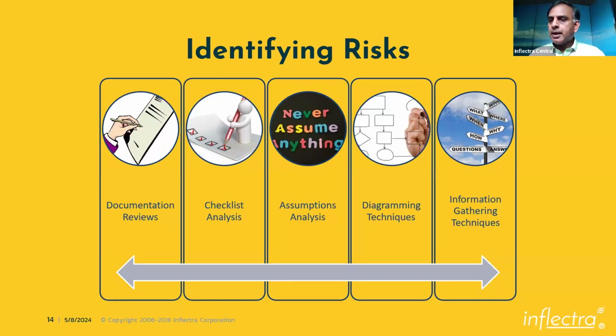Assumptions analysis. How well we are turning our assumptions into risks. If we have an assumption and that assumption proves to be wrong, you have a risk. And there's no point in telling me I have 3 assumptions, but I have no risks. Every assumption is loaded with risk.